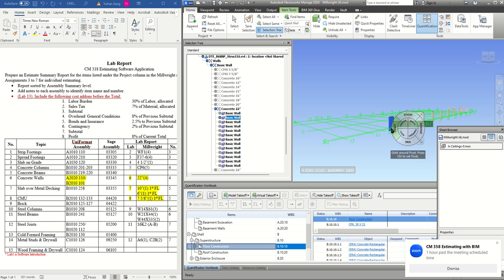Can you put both of them in the work breakdown structure? Which number? B2010 and then A2020. This is the Uniformat, the Uniformat WBS. If you look at the previous lecture, you will see the difference between the CSI and the Uniformat.